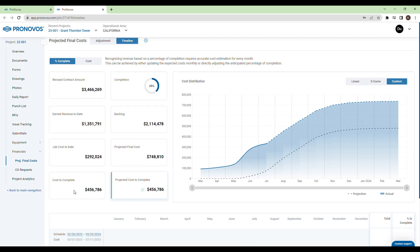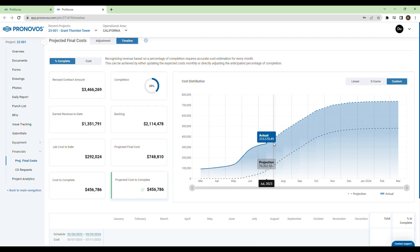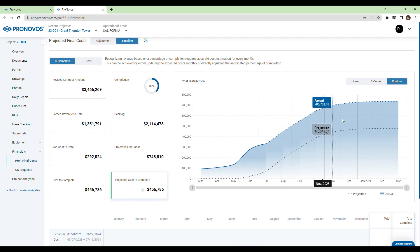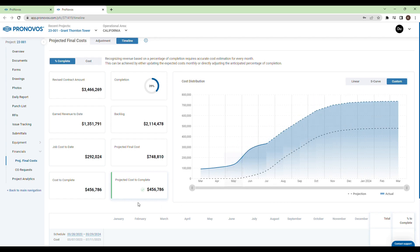On the right, witness the cost distribution curve come to life, displaying the monthly costs and the projected costs for the project's lifespan.